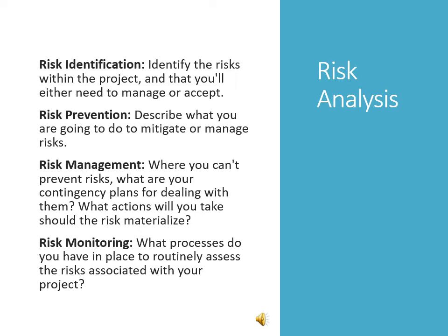Risk management, where you can't prevent risk: what are your contingency plans for dealing with them? What action will you take should the risk materialize? And finally, risk monitoring. What processes do you have in place to routinely assess the risks associated with your project?